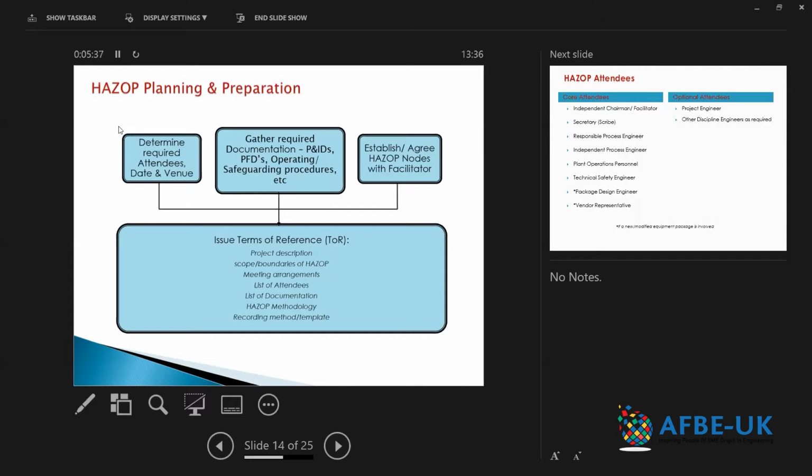documentation, the P&IDs. You're checking that the P&IDs are at the required revision status. Typically you want them done, sometimes approved for HAZOP. You want to be using P&IDs that are approved for HAZOP. As I mentioned earlier, sometimes you might be doing pre-HAZOPs or course HAZOPs. You could use second revision P&IDs, RO2, for those sorts of things. But for a substantive detailed design HAZOP, you want to be using P&IDs that are approved for HAZOP or approved at